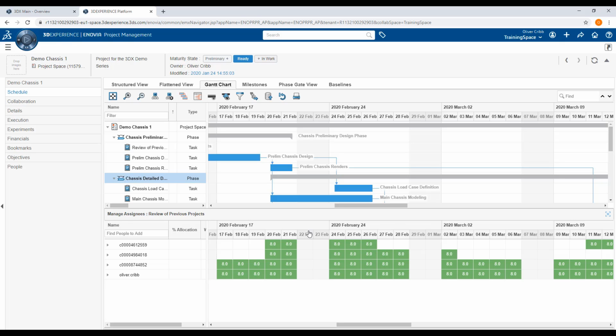This is a fairly small project with very few members and very few tasks. In larger projects, the approach is much the same, but just may require further iterations. The last point to make is that from this view, we can also identify which members are idle in certain periods, and therefore we know who we can assign to other projects to fill the remaining time.